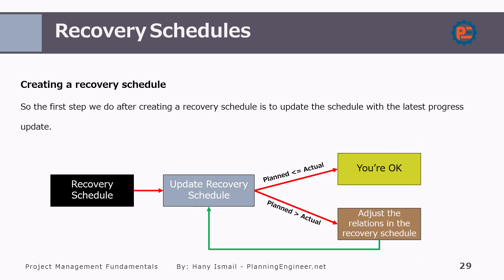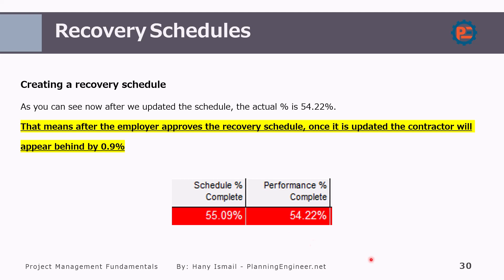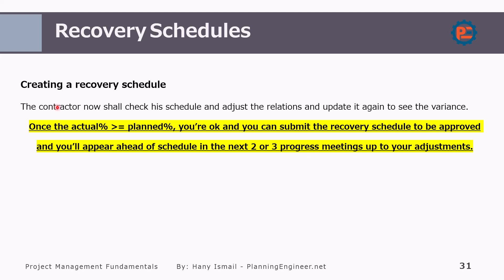Let's see an example. It doesn't have to be exactly the same — there should be some minimum acceptable variance. In this scenario, the scheduled percentage complete or plan is 55.09%, and the actual performance percentage complete is 54.22%. This means once you update the schedule, you will be behind by 0.9%. I don't recommend this scenario — the variance should ideally be around 0.1% or 0.05%. So the contractor should check the schedule, adjust the relationships, and update again. Once the actual percentage is more than or equal to the plan percentage, you are okay and can submit the recovery schedule.